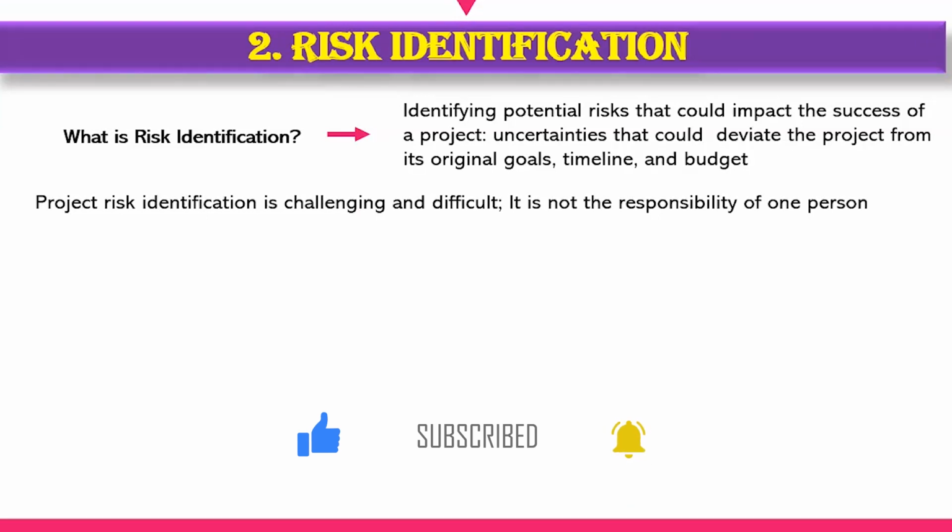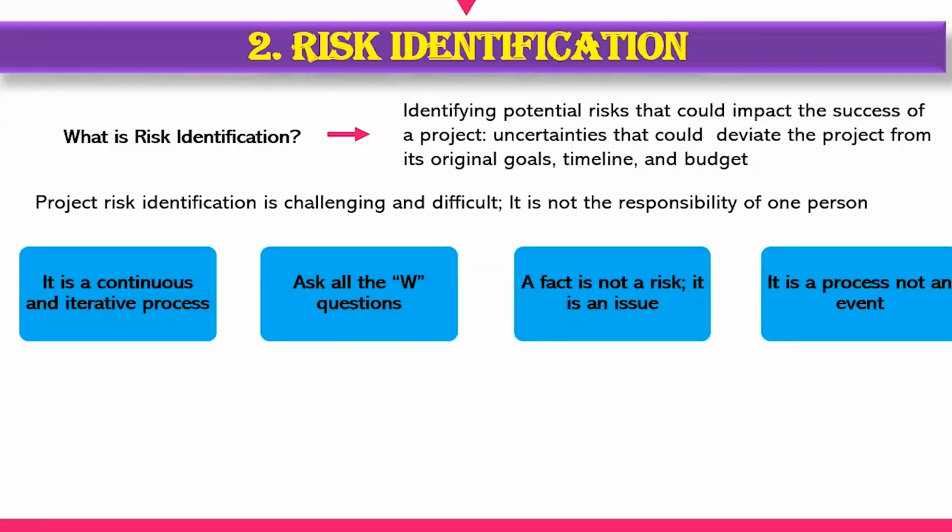It is not easy. It is not the responsibility of one person. Everybody has to be involved. Let us know from this point that risk identification is a continuous and iterative process. We need to ask all the W questions: what, what if, when, why, where, which. These questions, as we begin to ask them, will help us elicit all the risks on the project.